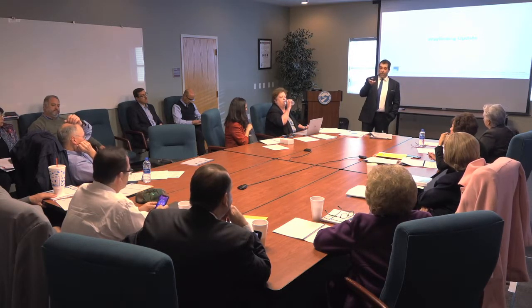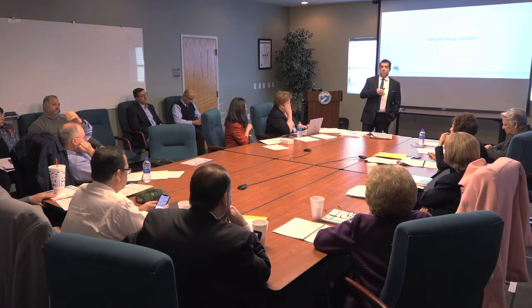So at this time, that's the update. On Monday, by the way, we'll be meeting with the city to discuss any options, maybe in terms of a variance, because right now Northwest and Trans Mountain are residential areas. If you recall, we went for rezoning, and then we had to unrezone it. Well, it seems like we might have to go to rezoning again to be able to build all the signs, because their limit right now is 10 feet. And honestly, a 10-foot sign by the highway is not even worth it. If we can get it rezoned, it'll be 35 feet, which is much more preeminent. So I will come back to you later with an update on that.